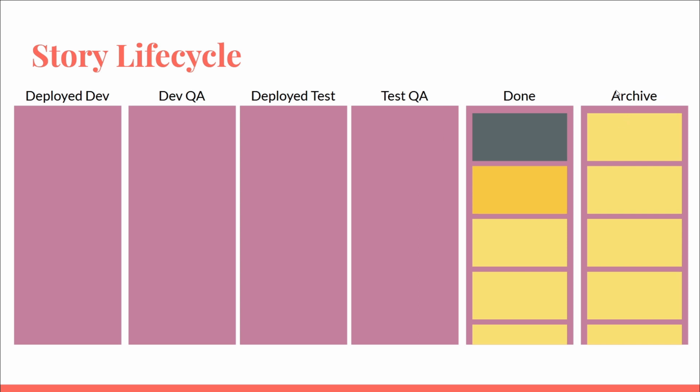We talked a little bit earlier about how, if you have a ticket that says make the red button blue, and you have another ticket that says remove the red button, then, if you do the remove the red button ticket, the make it blue can just be archived. It's no longer needed. Or you used to have a feature that you were going to implement, but now you've decided that we're not going to go down that path, so you archive it so there's still record that that was planned out and what the plan was. In case we ever do want to go down that path again, we can take it out of the archive, but that's what the archive is for. It's just kind of like stuff that doesn't need to be in backlog because we're never going to do that work.